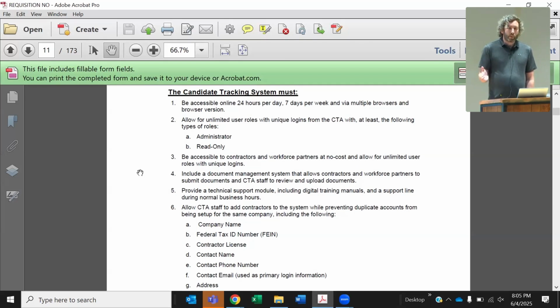So with these public agencies, it's not strictly low bid. It's usually about 70-30. So 70% would be technical proposal, 30% would be actually the cost. And so a lot goes into it. And the evaluation committee is usually around 5 or 7 people of various crafts.